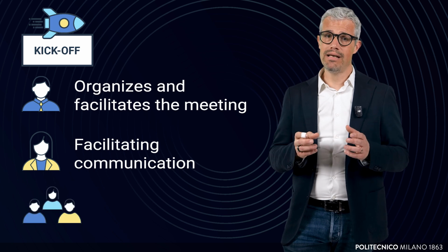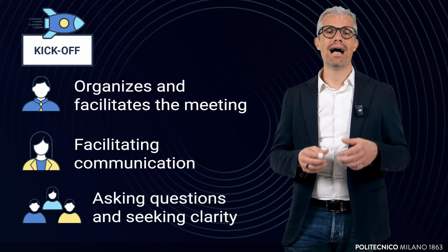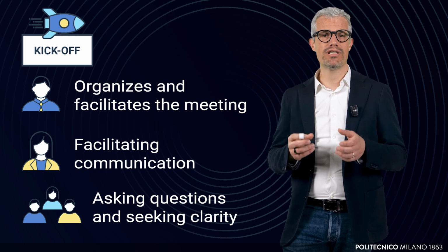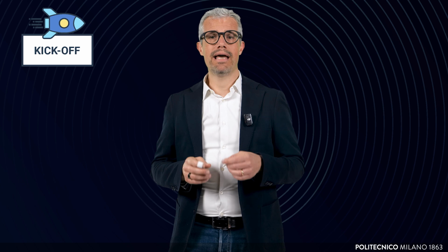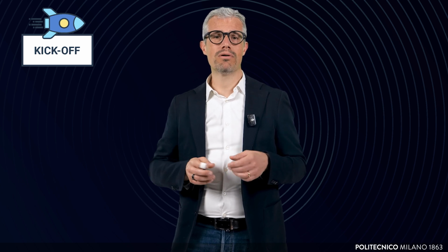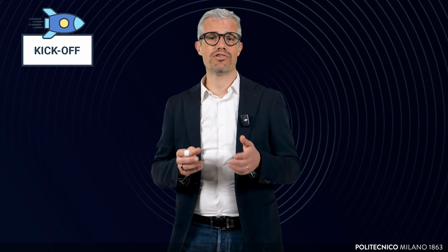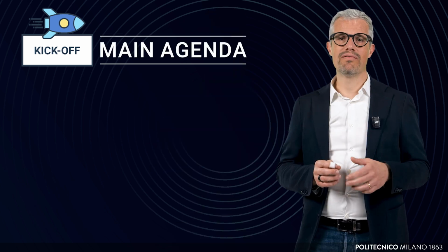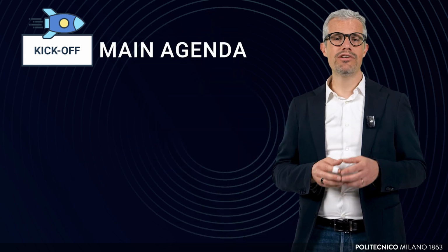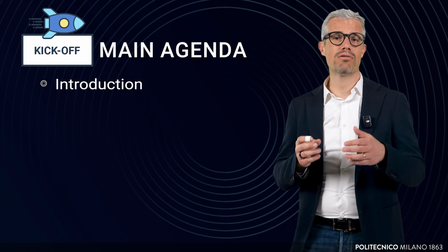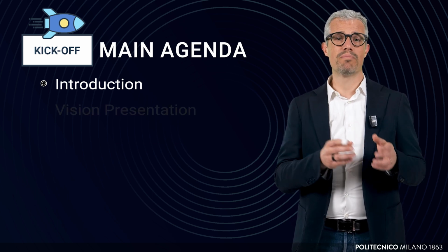The development team actively participates, asking questions and seeking clarity to ensure they fully understand the vision and the stories. The customer should be present and can also involve key stakeholders or end users, introduce the vision and answer questions to provide additional context. The main agenda of a kickoff meeting includes introductions, establishing rapport among all participants to foster collaboration and trust. Vision presentation.